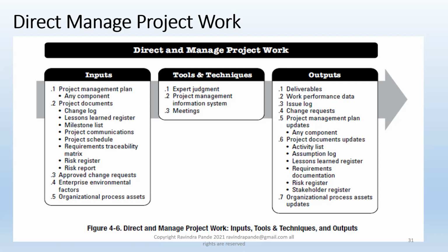The work performance data. Normally, in work performance data, we talk about the number of hours spent on a particular task, right? And we plan it out. Now, whenever you commit such work, we normally try to understand, are we going to the plan? Meaning if somebody says I'll take 5 hours to complete this task, he or she should take 5 hours or less than that. If it's more than 5 hours, our plan is getting damaged. Our plan is getting skewed, right?